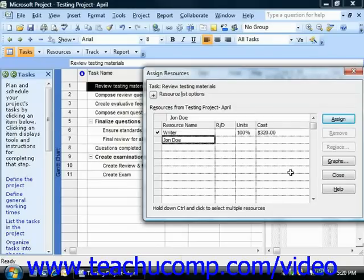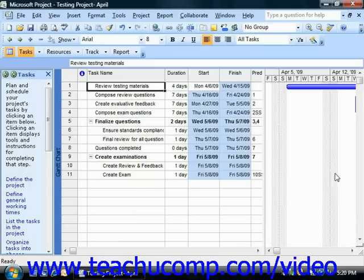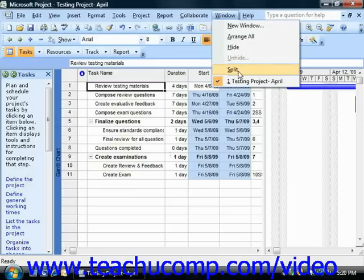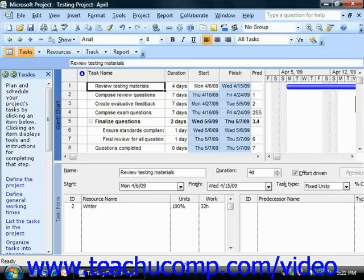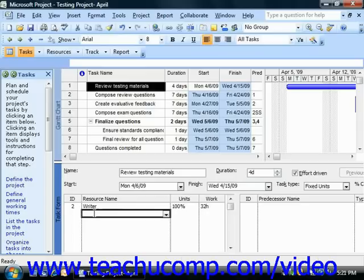Once you've finished making your work assignments, you can click the Close button. You should be able to see the resource assignment information for the selected task appear in the task form at the bottom of the window once you have work assigned. You can also assign work resources to selected tasks by using the task form view shown within the Gantt chart view. For example, if you wanted to add a second work resource to a selected task, first select the task in the Gantt chart view. You can add a resource by clicking into the next available blank row in the Resource Name column within the task form view, and then use the drop-down arrow that appears to select the name of the second work resource to assign.